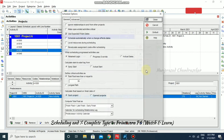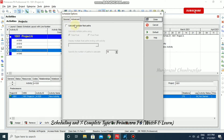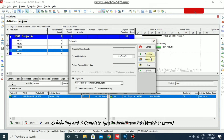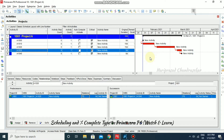We also have options where we can choose whatever we want — these can be done at a later stage. We have general and advanced settings. After scheduling, the original duration is now 30 days and it is also showing the critical path. This is how you schedule a project in Primavera.